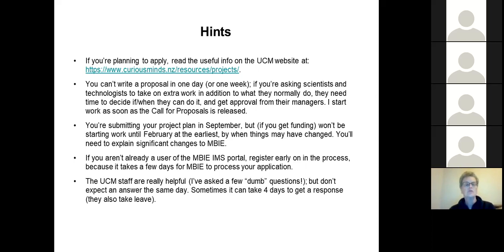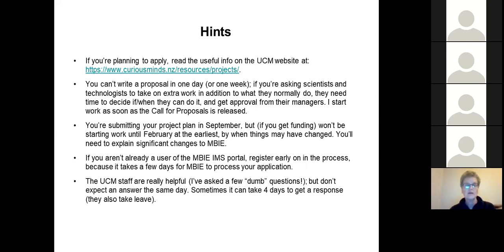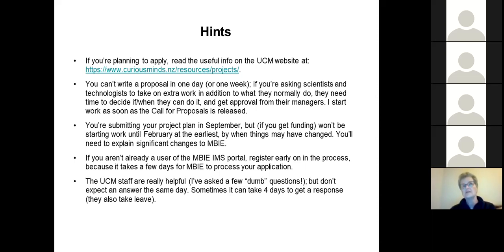You're submitting your project plan in September, but if you get funding you won't get any money until February at the earliest, and things may change — interim prices change, or scientists who were going to be involved may no longer be available. I had to explain changes to MB and that wasn't an issue, I just had to explain why. If you aren't a regular user of the MB portal, register early because it takes a few days to process. UCM staff are really helpful answering questions, but it can take them a few days to respond.